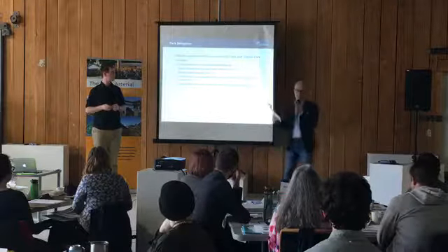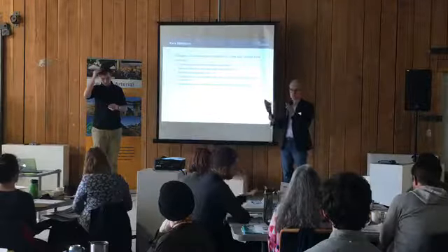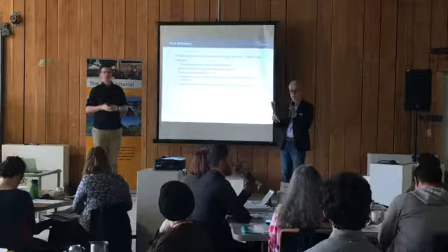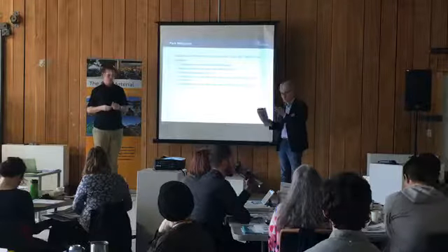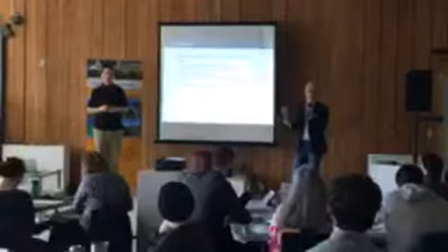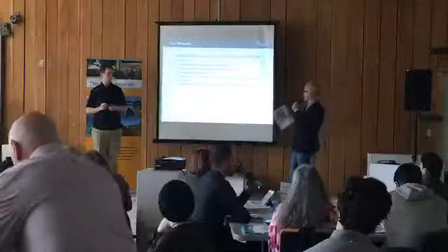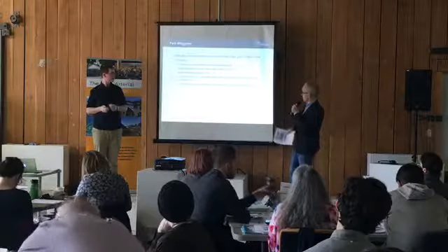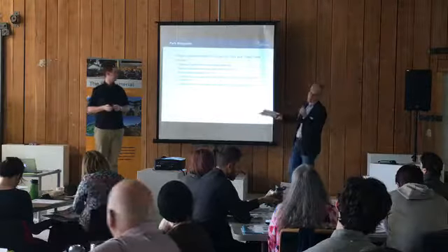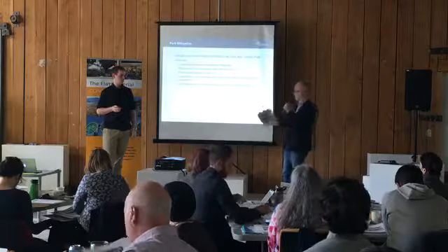So the impact on a park would not only be the chunk of the park that may be taken to go towards one of the options, but of course the adjacent piece of the park to that, especially if there's a grade change, has an effect on the function of the park that remains. So there's some mitigation that has to happen outside of the boundary of the alignment, and that varies from alignment to alignment. Some are minor, some are major.